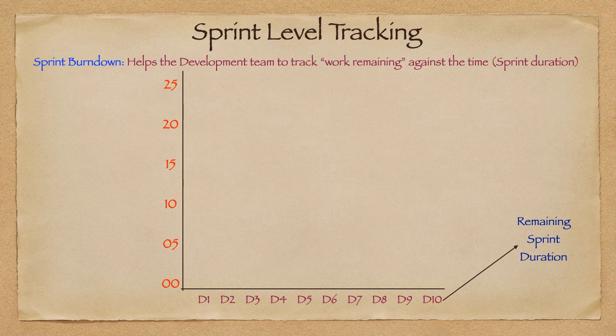There may be different estimation techniques, but most of the time teams follow story point estimation, which is called relative sizing, based on three parameters: complexity, uncertainty, and volume of work involved. The team will assign a number to each backlog item. That represents story points.